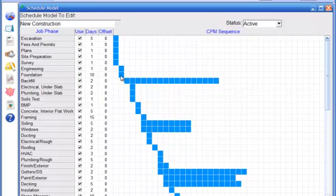But once the framing is done, there are a number of things that can be done at the same time, such as rough electrical, rough plumbing, or HVAC.